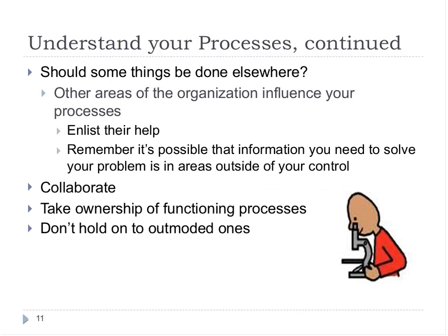You really want to avoid also scope creep. You've probably heard of that, when the project keeps getting bigger and bigger and bigger. And that's why we really want to have a picture up front, when we're developing our plan, of what the finished project looks like. We really want to focus on that. Now, sometimes it's unavoidable because we run into a real showstopper. This is absolutely we're not going to be able to implement unless we do whatever it is that we have to do. And again, that's one of the reasons we want to build some cushion in there, so that if you run into a showstopper, you've got the time to develop whatever your workaround is. But you really want to focus on core functionality for the new software that you're putting in place.